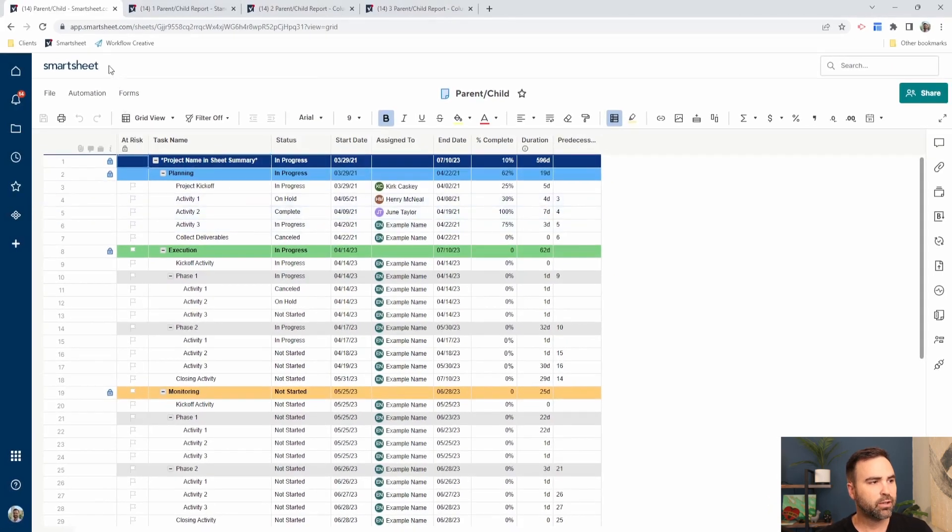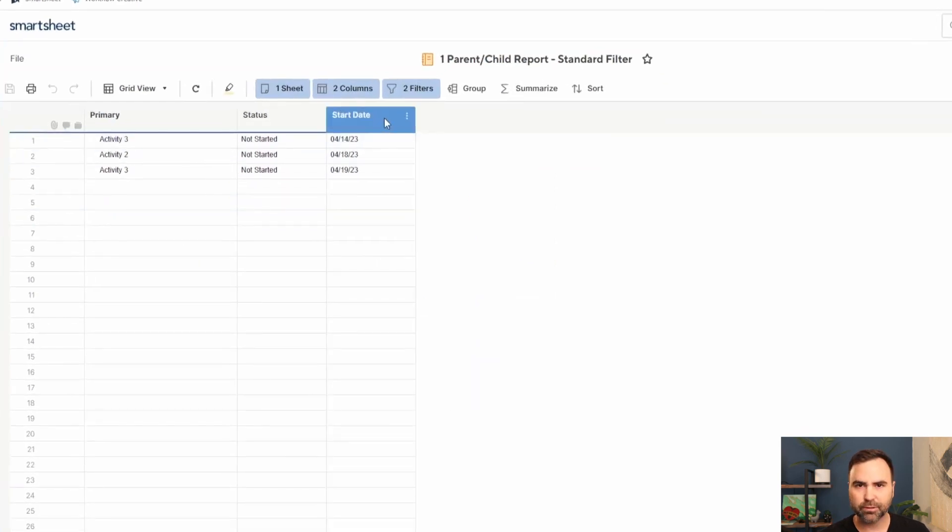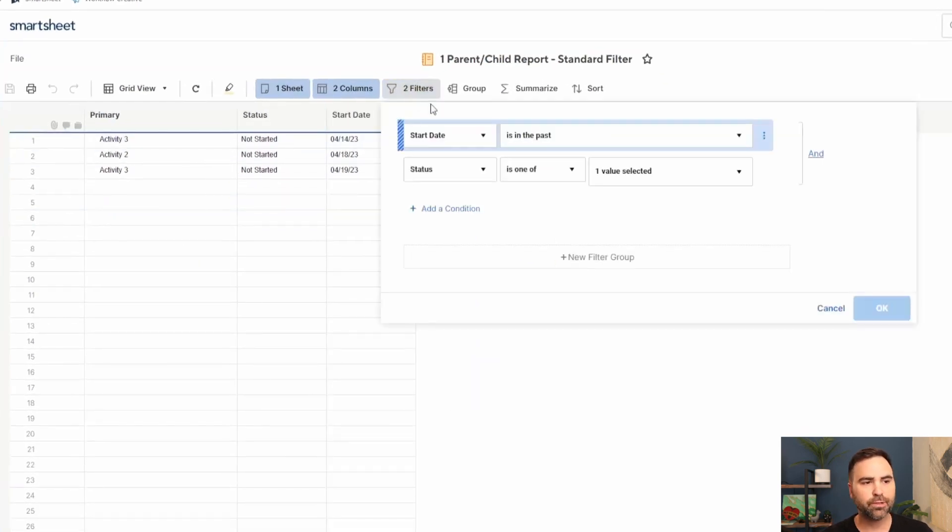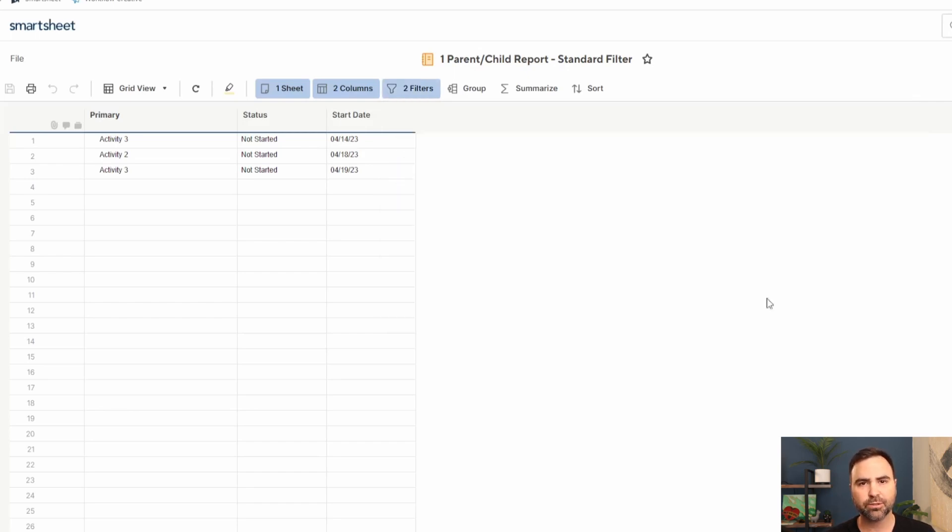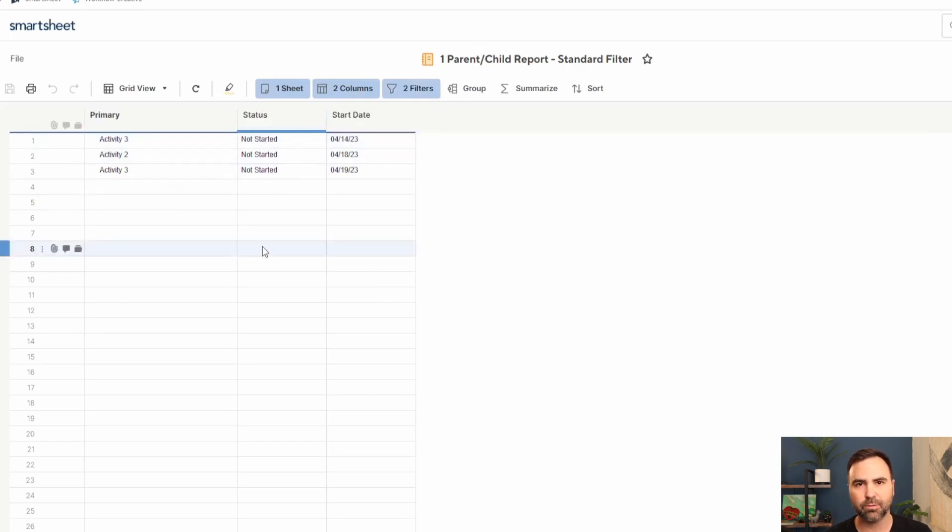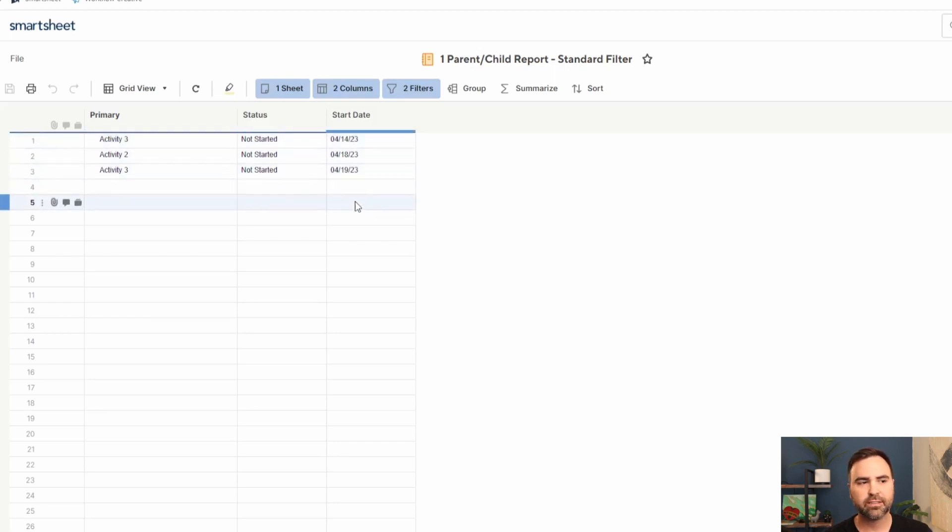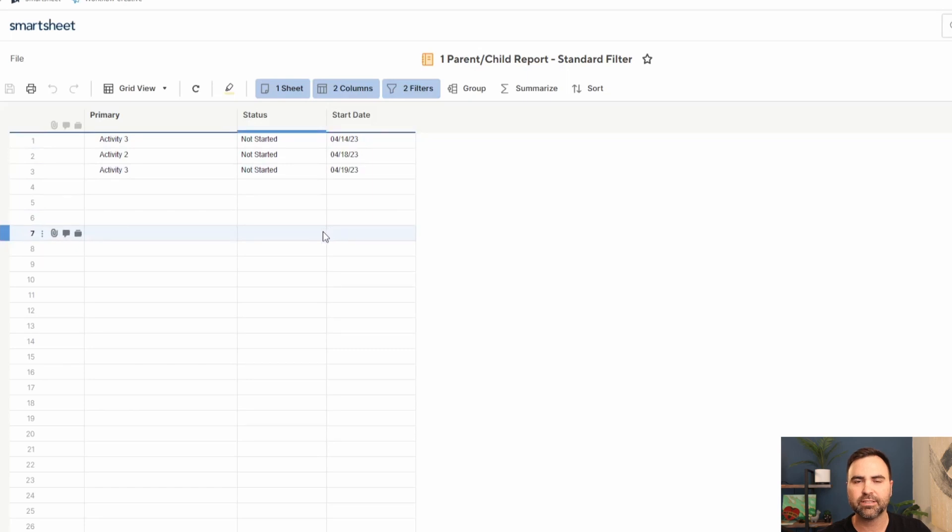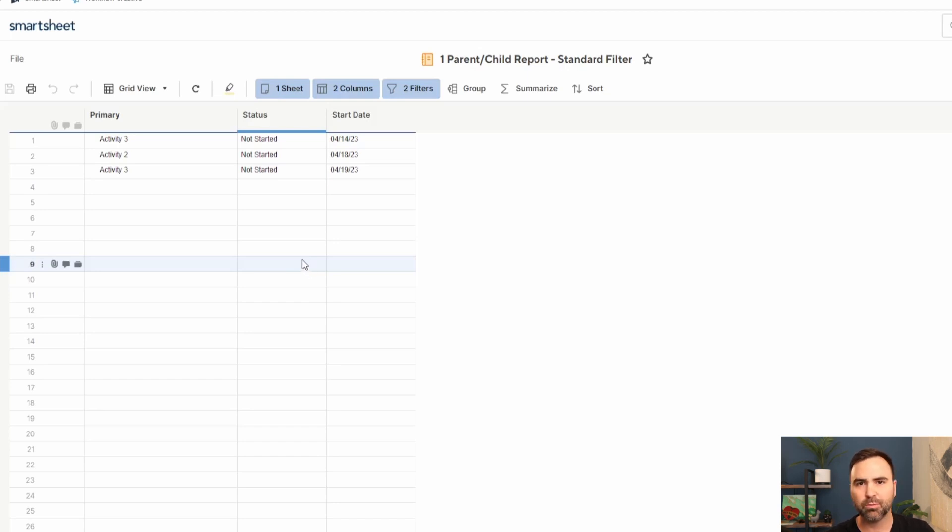If we take a look at a standard Smartsheet report that has standard filters on it, the two filters that we have are the start dates in the past and the status is not started. So when those two things are true, it's going to show those items on our report. But you can see here that this report has two activity threes with two different start dates. Standard out of the box, this doesn't give us enough context to make any decisions off of this data or to really understand what we're looking at from our report.